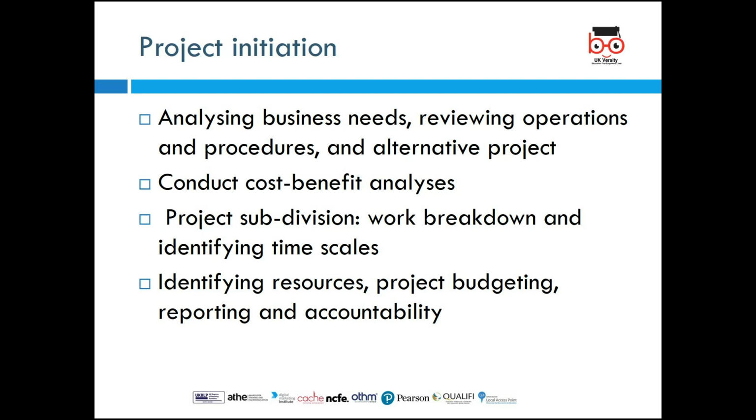And then you think about your project subdivisions. If you choose any alternative project, we need to design what is called a work breakdown structure. What is going to be done in the first phase, the second phase, the third phase, and identify the time frame for each time scale. So if you have phase one of the project, phase two, phase three, phase four, phase one is going to be how many weeks or how many months or how many days? What about phase two? What about phase three? What about phase four? So you will have project subdivisions with a work breakdown structure for every phase and time scale associated with every phase of the project.